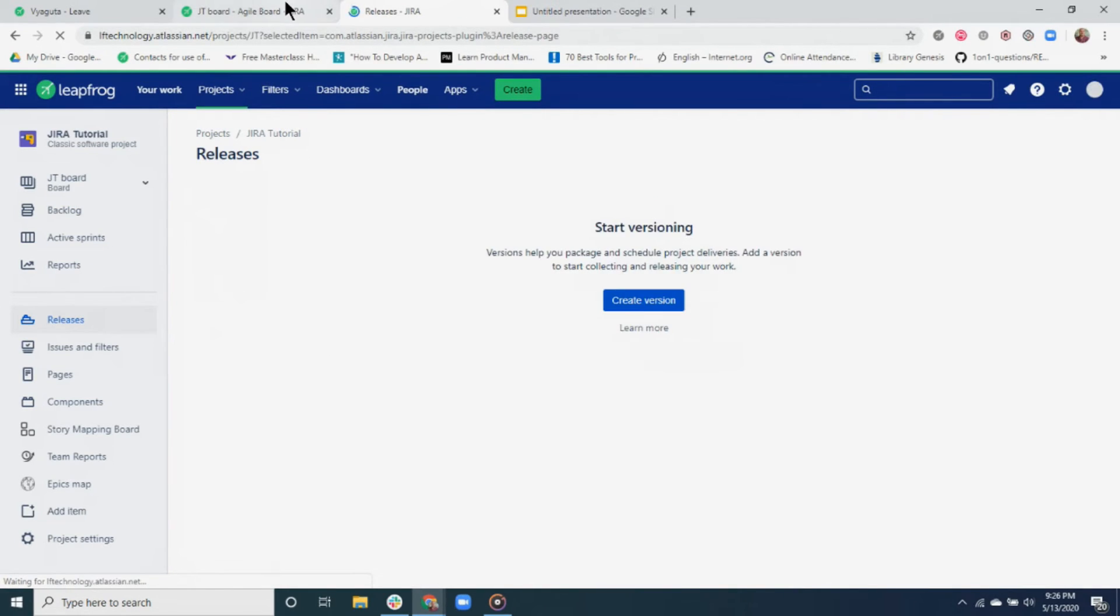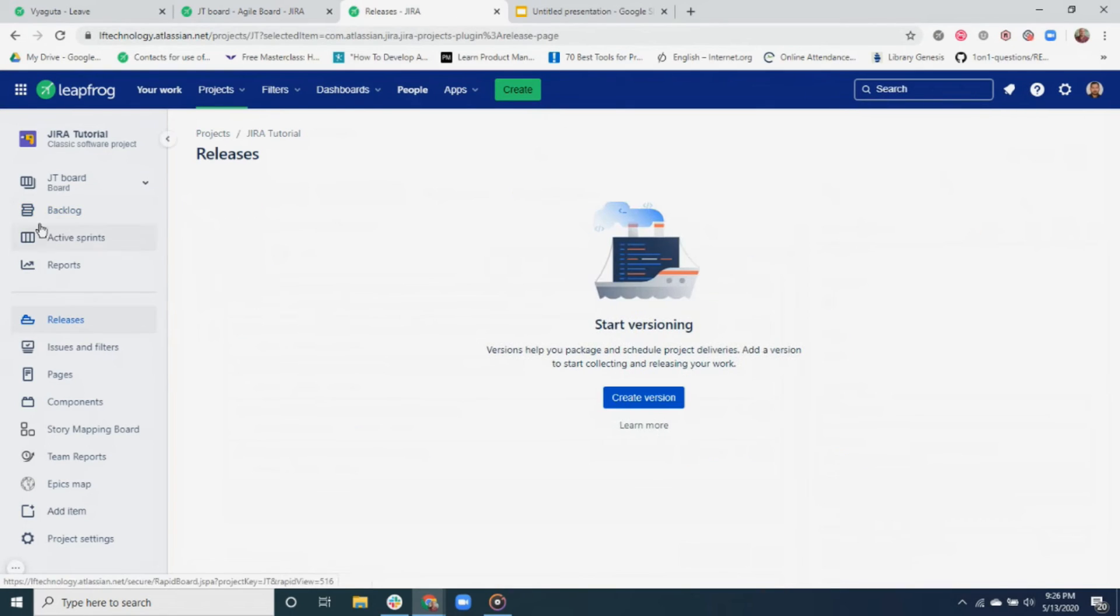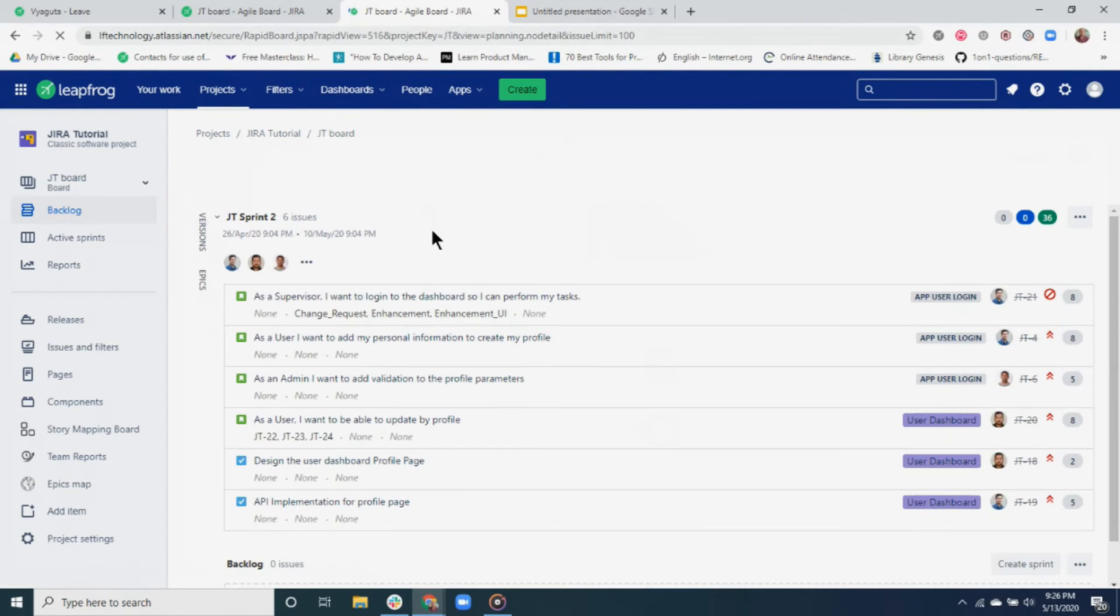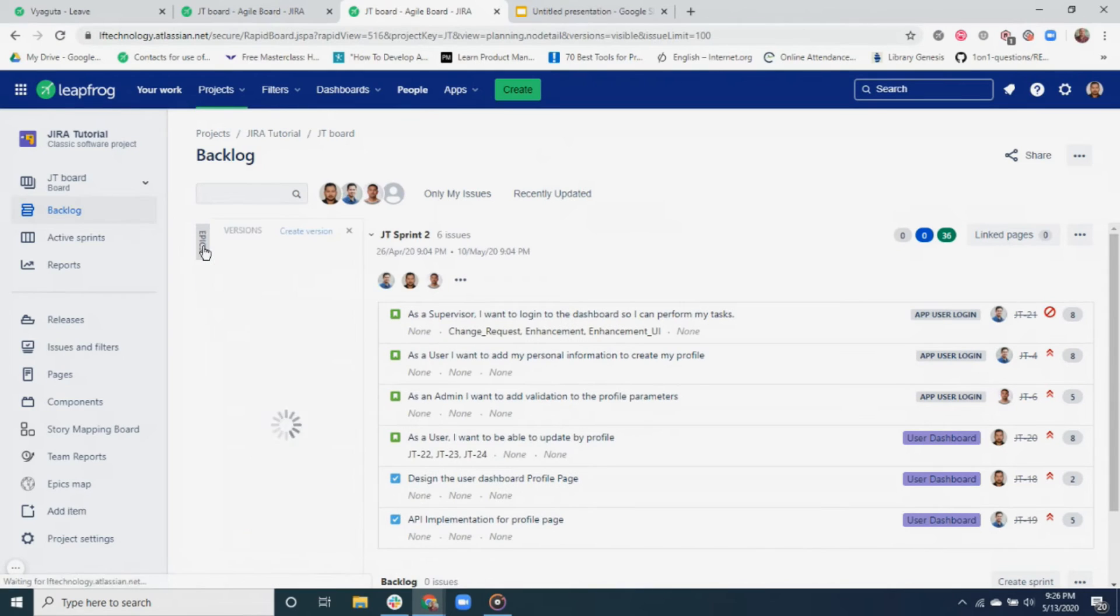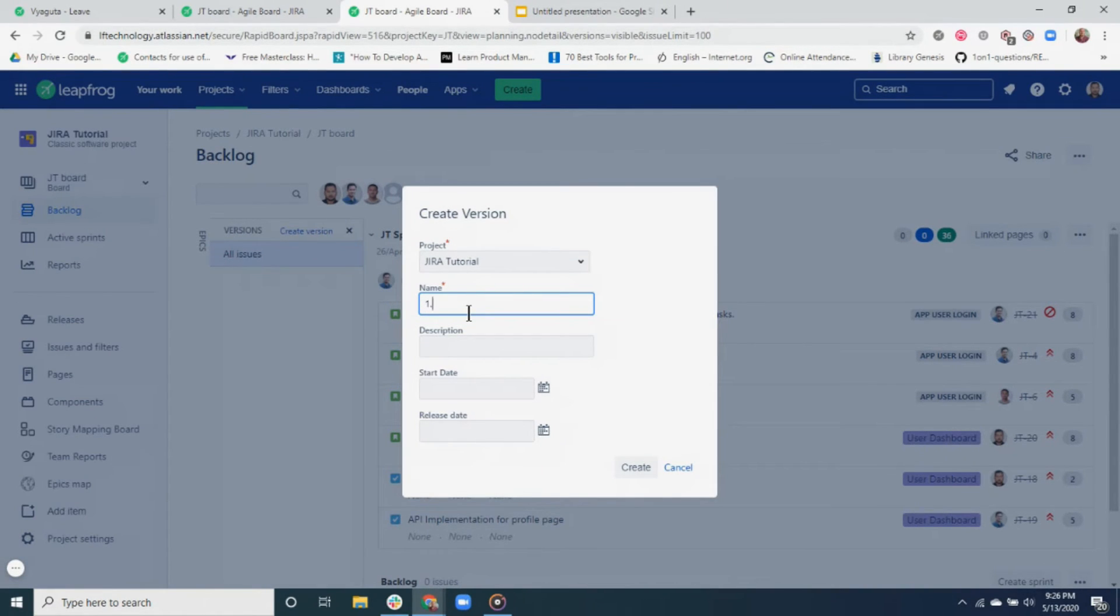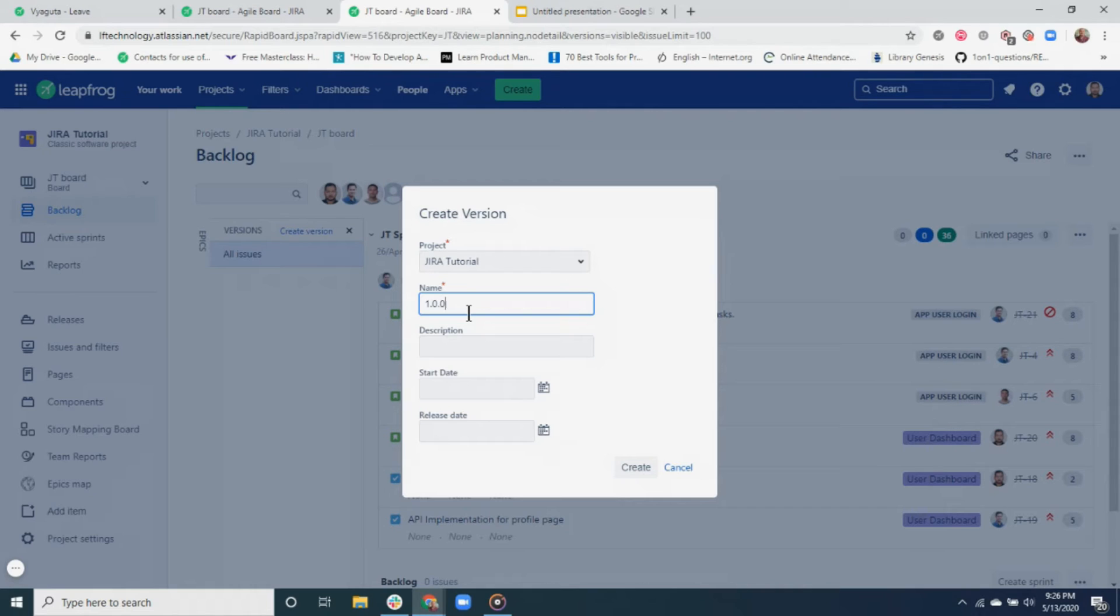For now, let's go back to the backlog and create a new version. Let's add a version name following the semantic versioning guideline, which basically means major, minor, patch, etc. If there is a major overhaul in the system, for instance, we added a new module, then we can tag the major version. On the contrary, for feature enhancements and improvements, we usually tag the minor version. For other tasks such as hot fixes and bug fixes, we tag the patch release. For our example, I'm writing a 1.0.0_UAT version.